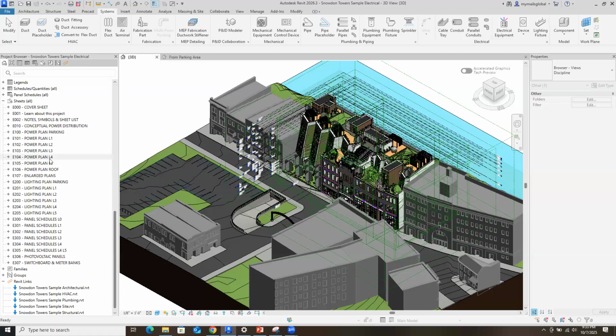And the very first thing the BIM manager does is the BEP, that is the BIM Execution Plan. Okay, so he creates the BIM Execution Plan, and he sends all his documents to other disciplines, and he gets approval of that particular discipline.